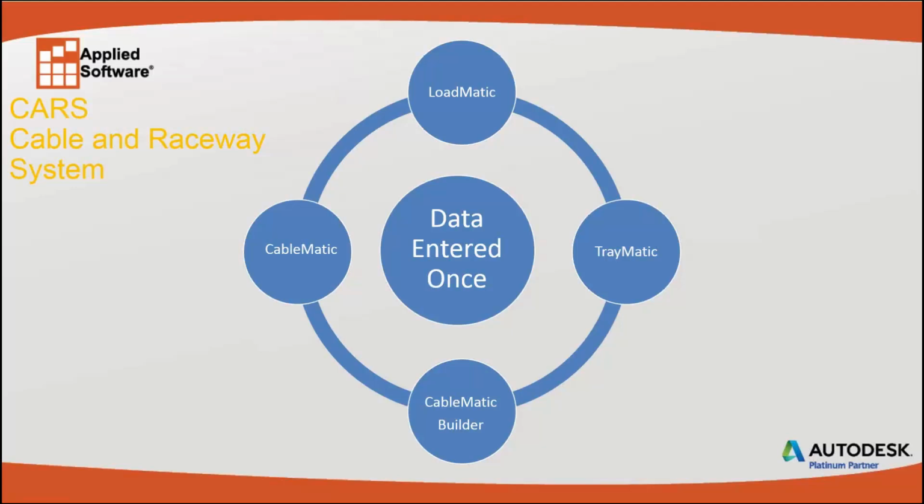Well, now we'll have the database available to the folks in the field who are actually doing the construction. So they'll be able to use this database, create pull tickets, termination reports, do pull planning, assign cables to specific reels, plan their pulls, and keep track of their inventory and the status on the project. And any information that construction needs, the construction will be working with their database.